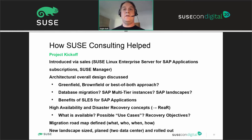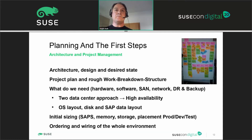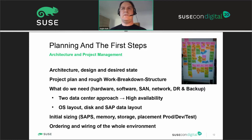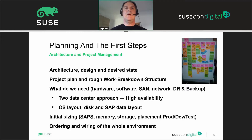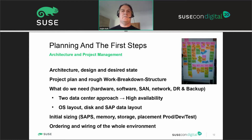The migration roadmap was defined — what to do, who does what, when, and how. The new landscape was sized and planned across two data centers. Planning the first steps around architecture and project management: you need architecture design and a desired state, which ends up in a project plan and work breakdown structure. Having project management by your side is very helpful. Then you need to identify all requirements: hardware, software, storage, network, operating system layout, disk configuration, and SAP data layout.